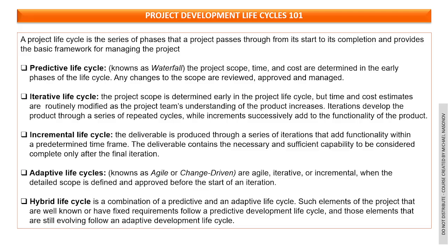First of all, the predictive life cycle, known as waterfall. The project scope, time, and cost are determined in the early phases of the life cycle. Any changes to the scope are reviewed, approved, and managed. Remember the change request.